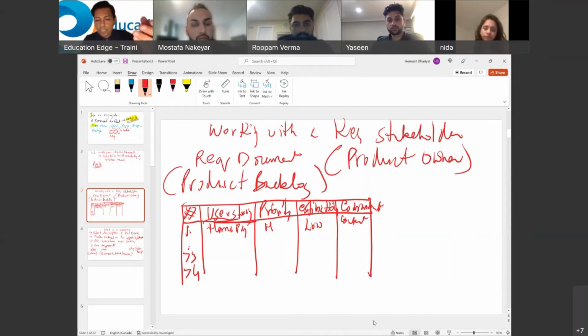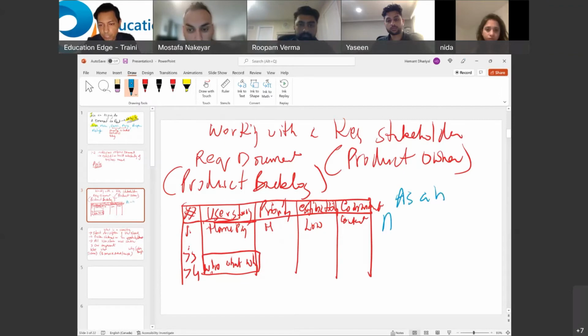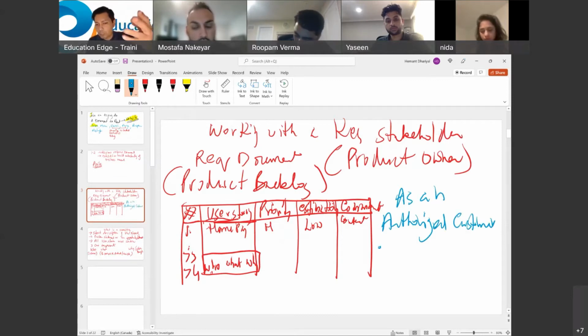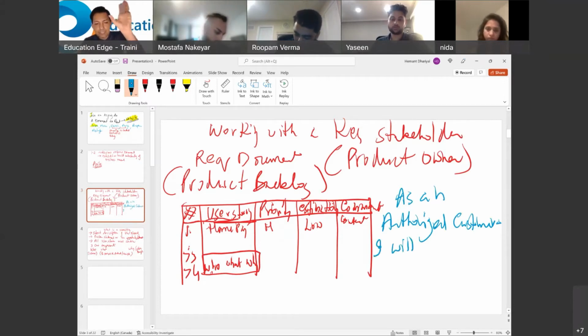But you don't just say, well, 74, who, the customer, what, they would like to pay the bills, why, so that they don't have to go to the branch. They save time. Three things. But no, this is not how you write it. A user story contains three core components, but what is the meta language? As an authorized customer, you should be logged in to pay the bill. As an authorized customer, so you are saying it from the perspective of the customer. I would like the ability to pay bills using my handset device.